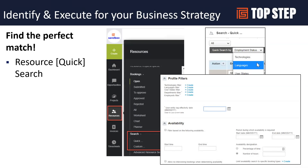If your resource pool is more complex — resources are not similar to one another, you specialize in multiple products, technologies, different regions or groups — then you may want to use OpenAir's profile options. You can set up resource profiles and have resources assign those profile elements to themselves, such as whether they're an expert in HTML or a beginner in JavaScript. You build out those databases of elements, which don't have to be just technologies — you can search by willingness to travel or language. Once you create those profiles and assign them to resources, they become very powerful to search on.